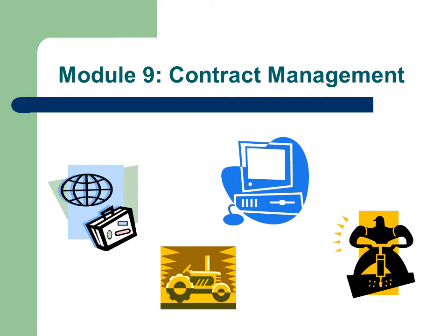up. The types of things which we may need to procure for a project may be contractors such as mechanics, IT specialists or tradespeople, tools and equipment, office supplies, rental of premises for an office or to hold an event. Not only does procurement involve seeking where to purchase or rent goods or services, it also means planning and managing them in the most cost-effective and productive way to ensure that the project gets the best value. This also means that the deliverables must conform to the quality standards and be delivered on time.